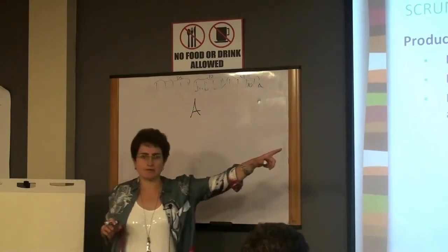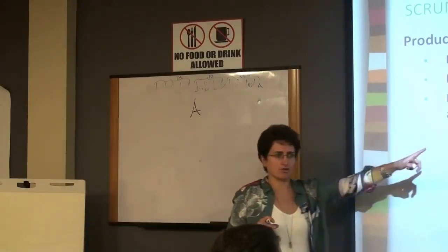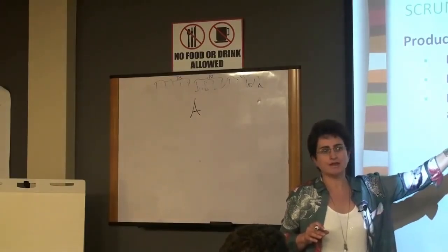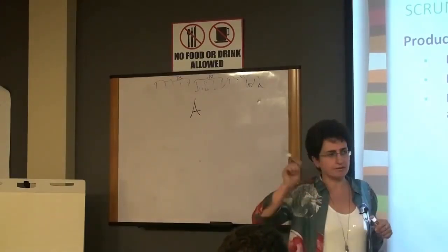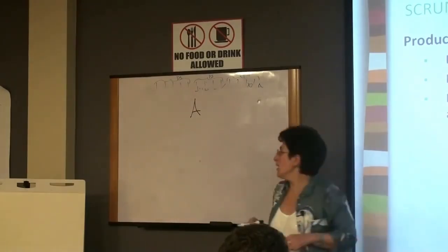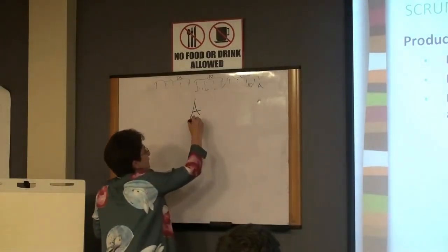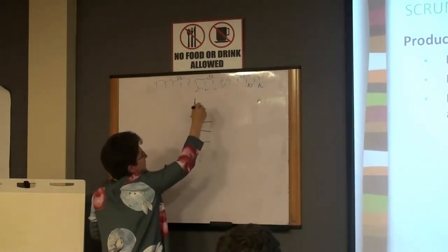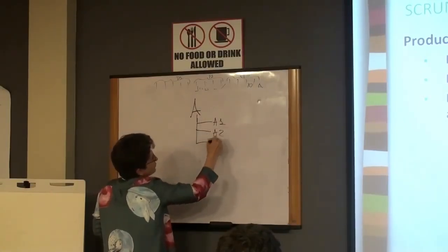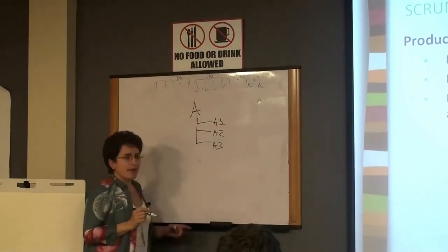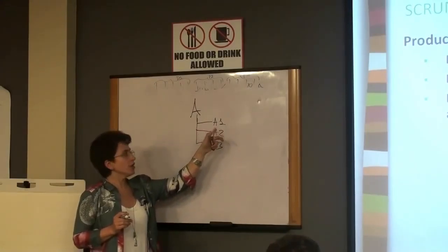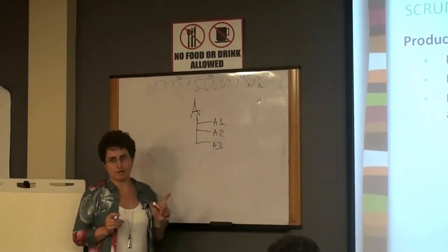Even in house painting, you can always break down your house painting job into ceilings, floors, walls. Then you can run some pilot experiment, paint like 5 square feet of your wall and see how long it takes you. And here, you can break your master task for this feature into smaller features, let's say A1, A2, A3. Then development and QA will try to project how long it will take to develop and test each of those sub-features.